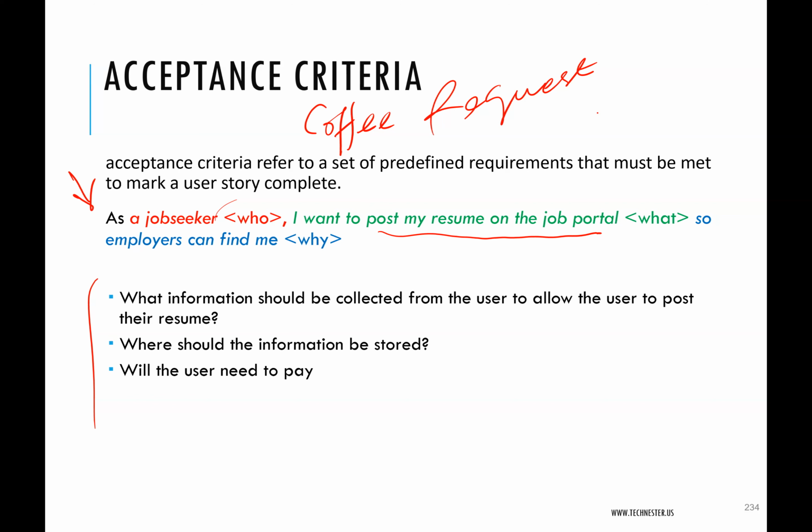So if I just say, as a teacher, I need a cup of coffee so I can stay awake at night, and I pass him the user story without my acceptance criteria of that coffee, no sugar, no cream, just black, right? How will he know? So Wale may go ahead and buy the coffee the way he thinks I would like it, and that coffee may end up falling flat, may fail because no acceptance criteria. So you see, you cannot provide user stories without an acceptance criteria.